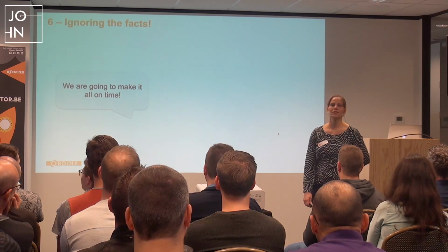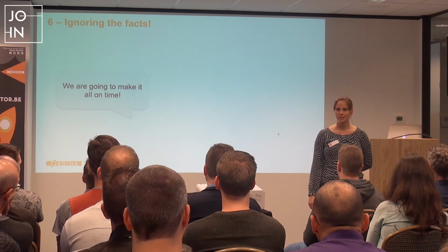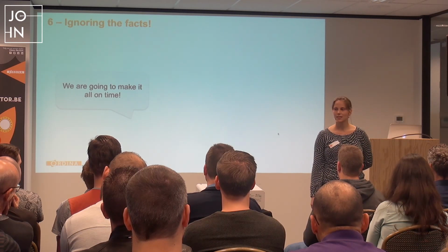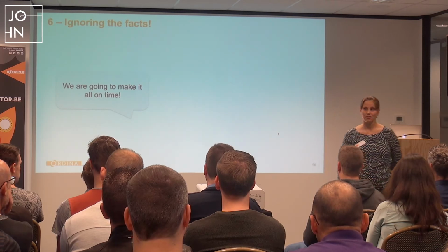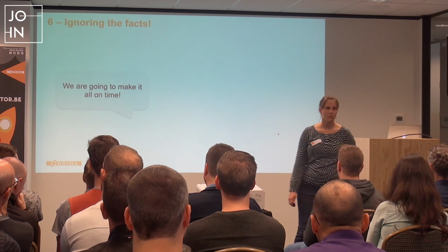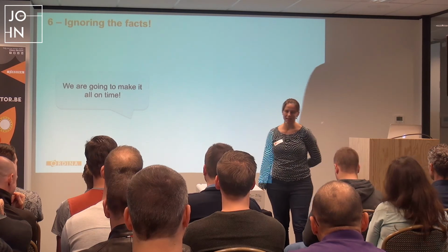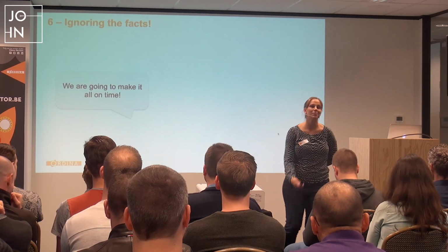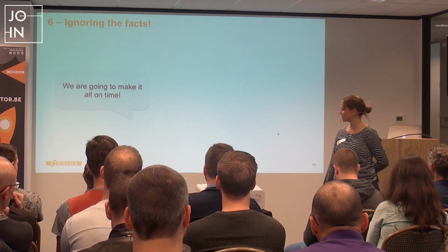A sprint review should be letting the user start up the application, work with the application, and if he gets stuck, you ask him why. Or what did you expect? The discussion about what comes next, what should be added, what should be done in the next sprint, that should be the main focus of your sprint review. That's why it's called a review and not a demo. It's not a presentation.